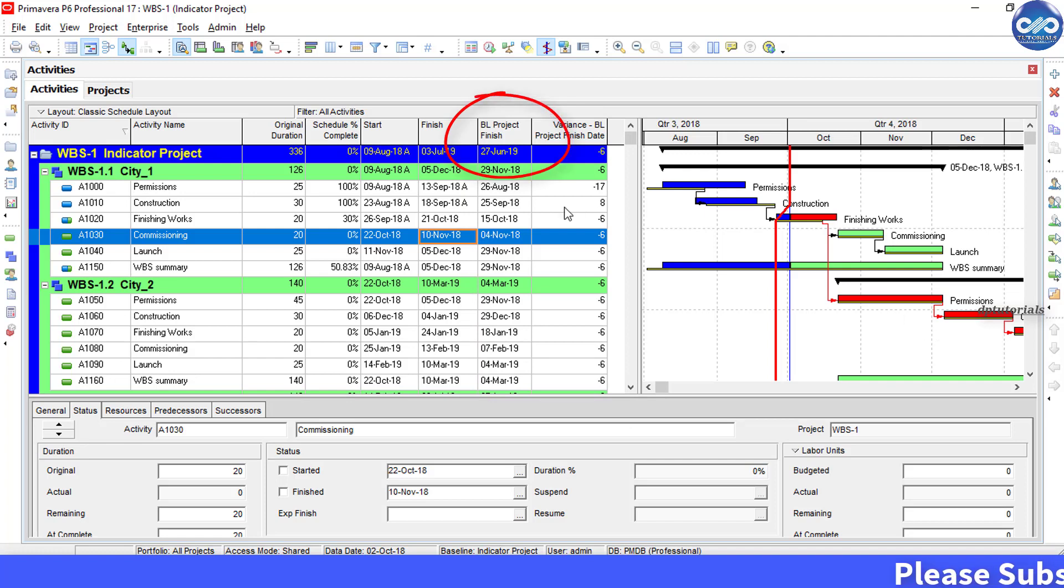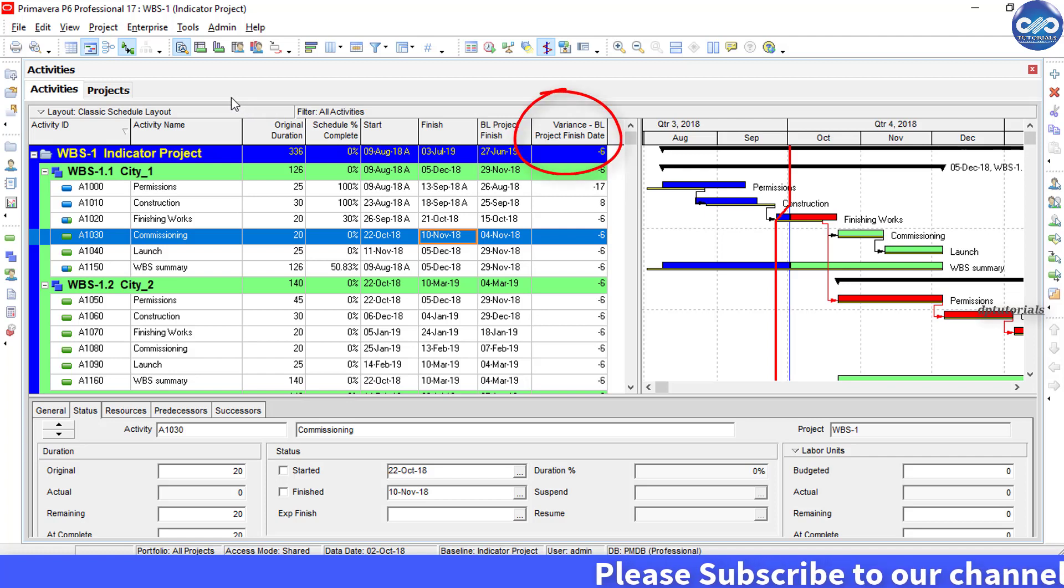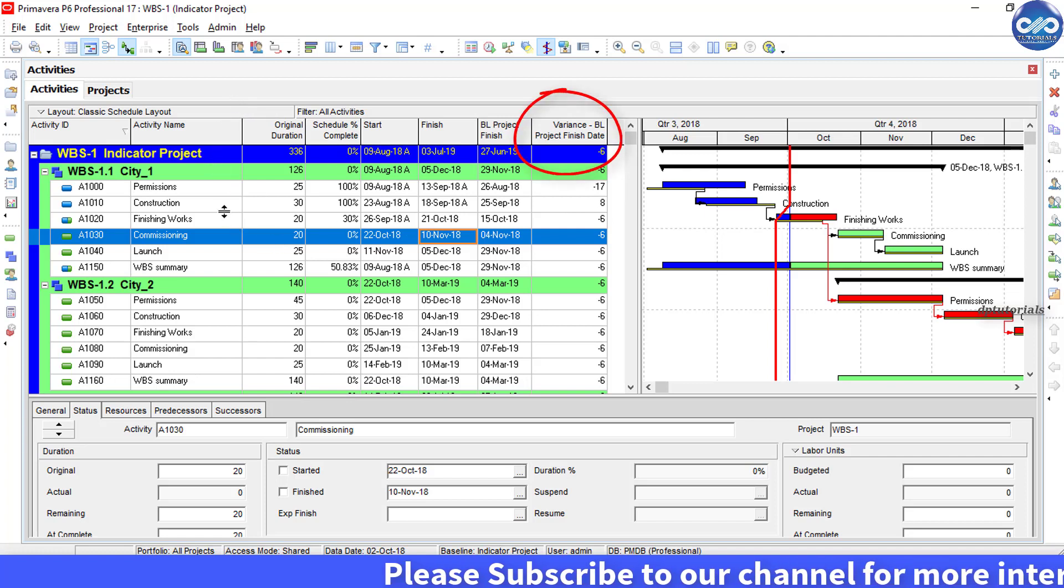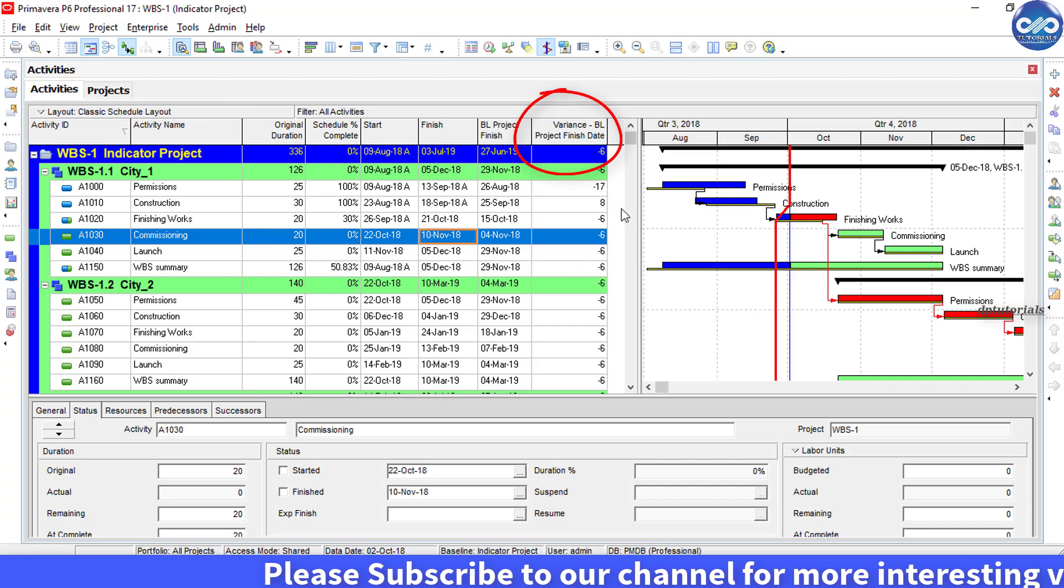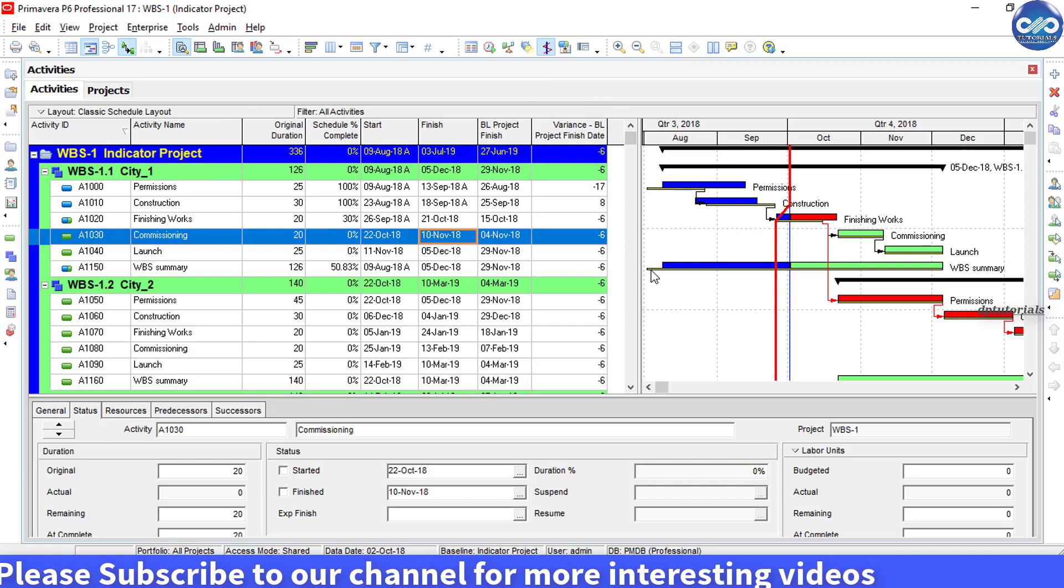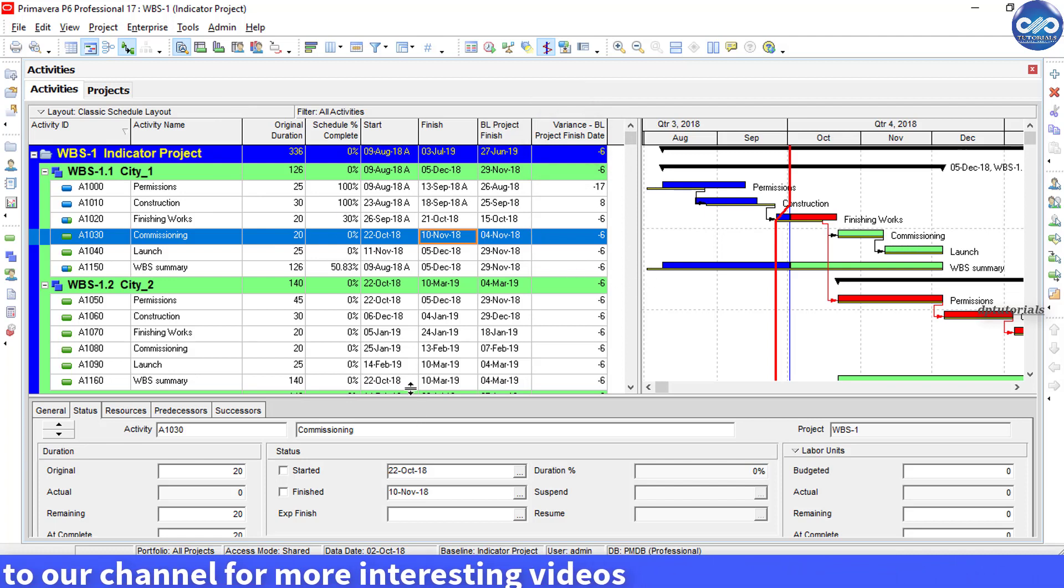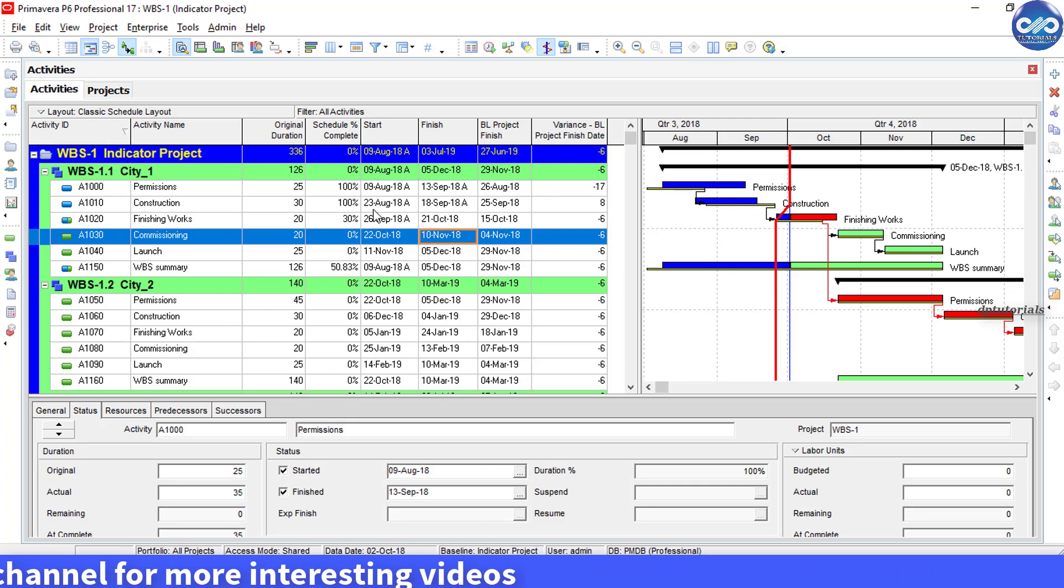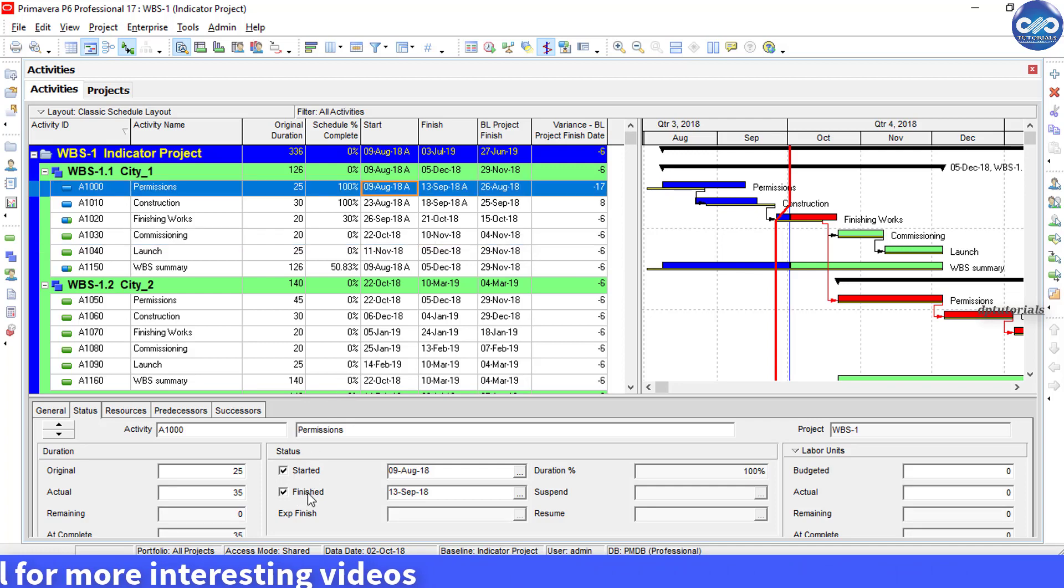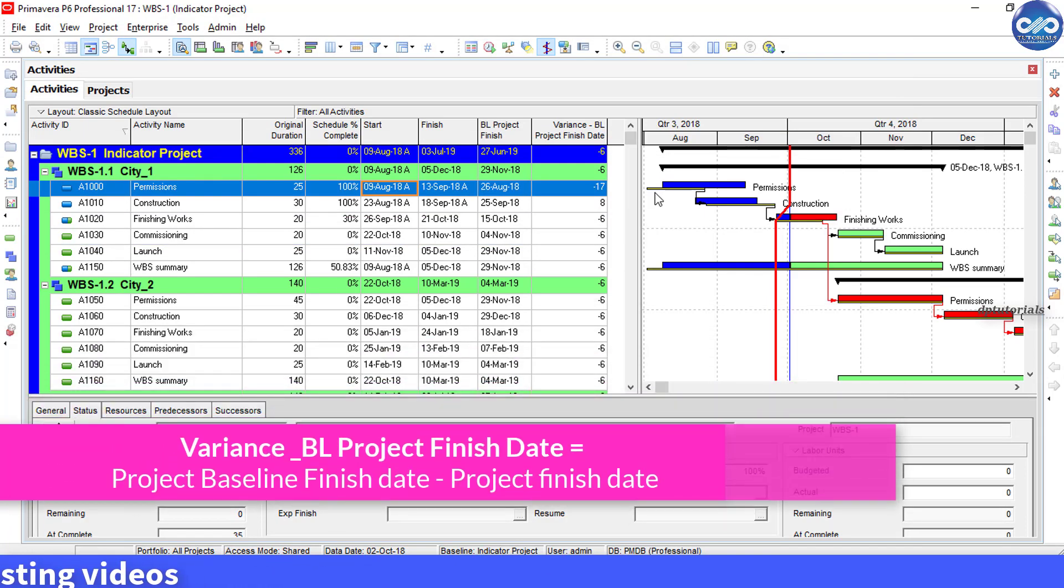We are adding two columns here. One is Baseline Project Finish - this is the activity finish date from the project baseline. The second column is Variance Baseline Project Finish - this is the duration between the baseline project finish date and the current finish date, which is equal to baseline project finish minus finish date.